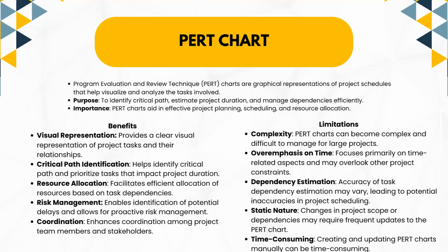The limitations are 1, complexity. PERT charts can become complex and difficult to manage for large projects. 2, overemphasis on time. Focuses primarily on time-related aspects and may overlook other project constraints. 3, dependency estimation. Accuracy of task dependency estimation may vary, leading to potential inaccuracies in project scheduling.